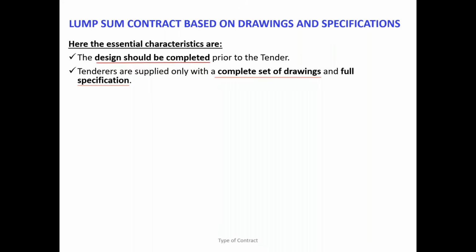Okay, what is missing here? The lump sum contract based on drawing and specification. There's no BOQ here. Do you understand? No BOQ. That is the one missing.